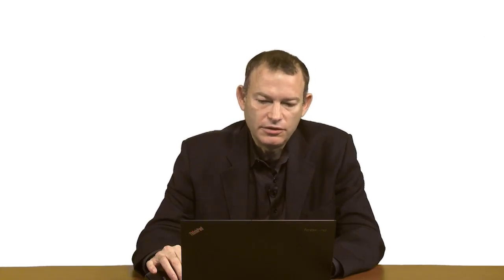You always look for the next available activities when the resource pops back on the network based on float. If there's an existing activity ready to go, you pick the one with the lowest amount of float. Based, of course, on task continuity. If there isn't a ready activity but there's an activity that you can consume some float and move it down the timeline, you do that. And the result is the safest, most efficient, and least expensive way of assigning resources to the project.